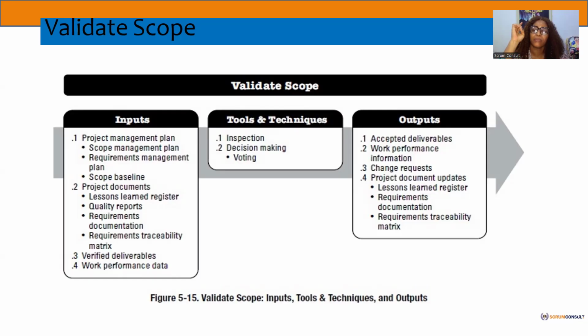When do you create the change? You update. Yes, update, very important. The documents. Not necessarily when they create the change or if they accept the change. Even if they don't accept it, make the necessary updates and finally communicate. Thank you very much.